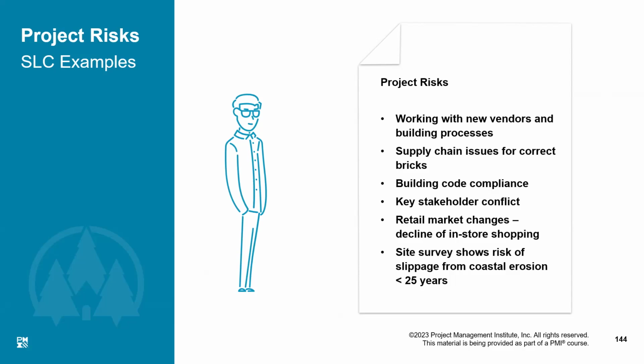How should our risk be written? Our risk should be written in a complete sentence composed of three parts. The first part should be the cause of the risk. The second part should be the risk itself. The third part should be the effect of that risk.